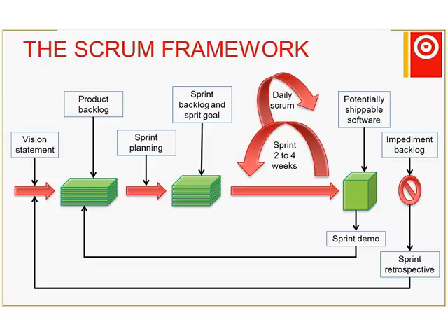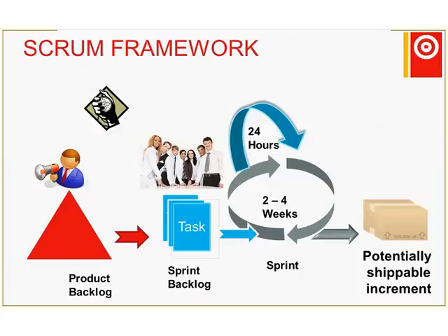And when you've got the potentially deliverable software, the output from that can be enhanced items for going back into the backlog, as in refining requirements for the future. It can also be fault reports and so on. The whole process is iterative, as shown on this screen. This is a slightly different way of looking at it, a simplified one. The backlog leads into a sprint backlog, the work to be done in a particular sprint. You have the iterations and you create a shippable increment.